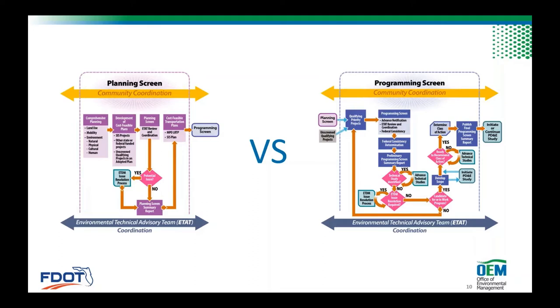But it's also a point in time where we're kind of prepping for the beginning of our PD&E. We're getting our advanced notification out and getting it cleared through the clearinghouse over at DEP. We're sharing this information with our partners because we're trying to figure out when we move into the PD&E